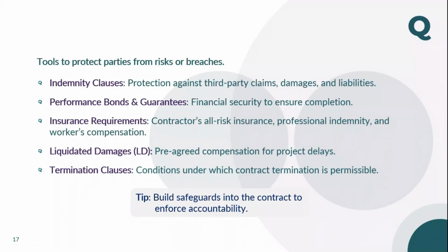In place means you have to ensure there is a provision in the contract for all those things. There is a provision for performance securities. Yes, I'm happy. There is a provision for the warranties. Yes, I'm happy. There is a collateral warranty. Collateral warranty means, in a contract, the first rule is only parties in the contract can sue each other. If me and my friend enter into a contract, we both can sue each other. A third party cannot sue. That means, if there's an employer, there is a contractor, and there's a subcontractor.